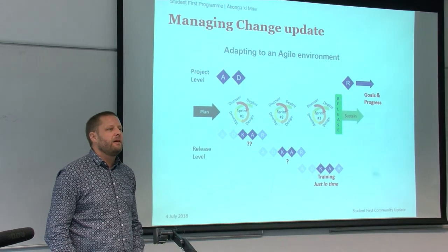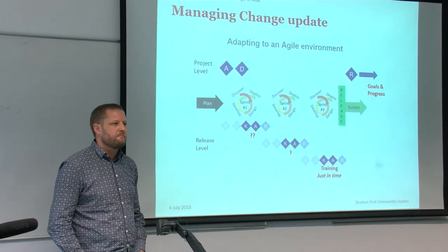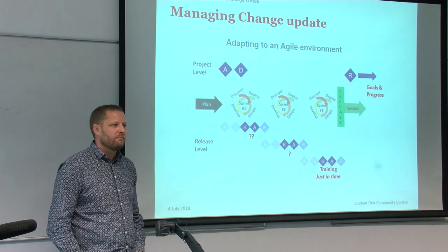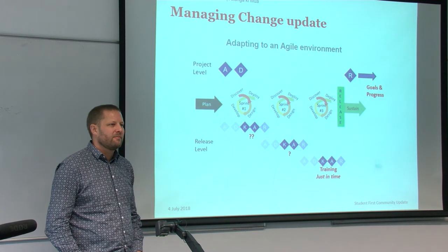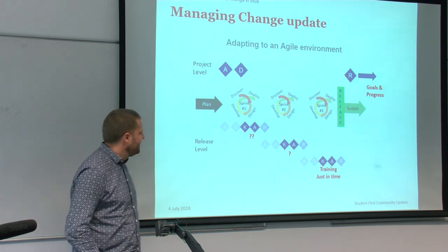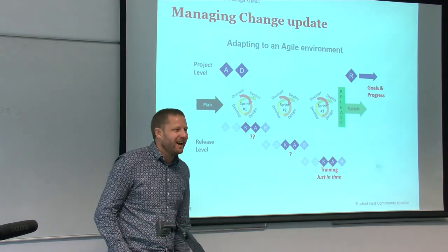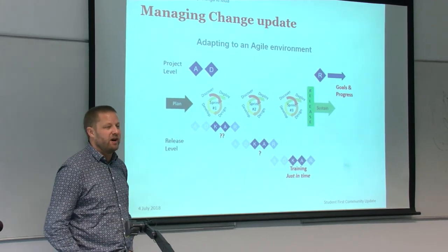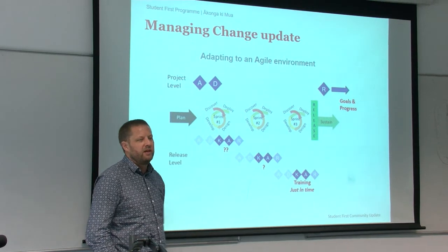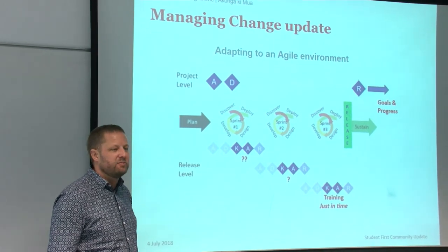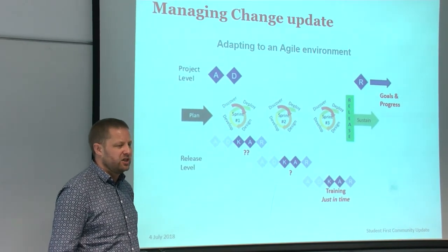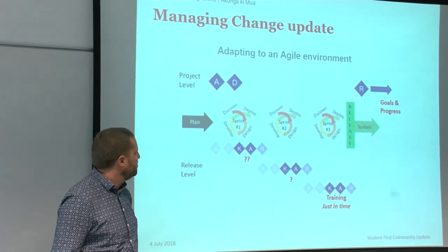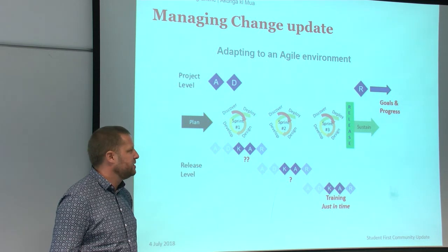I was just going to say, I thought the way we did the training last week before the release, 2 days before, was actually really good. Yeah, so there are advantages. Obviously we're much more certain as to what we need to be advising you of. If we tried to do it back here, we would probably be telling you stuff that's likely to change before the release goes live. So it puts a lot of pressure on the training team in the Student First program, but that's okay, we're learning to deal with that.